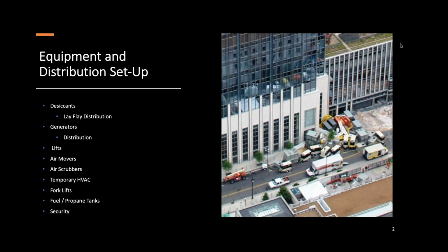Your equipment is getting loaded at the shop and getting on the way to the job site, or maybe traveling over the roadway at a slower rate than your production manager does, or maybe the production manager flew in. But you want to get there and you want to put together a plan for your desiccants. You want to put together a plan for where your lay flat is going to run, where you're going to put your generators and set up your generators.